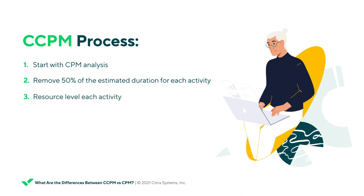The next step is to resource level each activity based on the space, staff, and equipment available. The goal with CCPM is to devote full resources to each activity, meaning it should stay on track to meet each individual deadline. Based on those resource constraints, you will then create a path from beginning to end of the project, known as the critical chain. The deadline will remain the unresource-leveled deadline, allowing for flexibility to adjust throughout the project process.